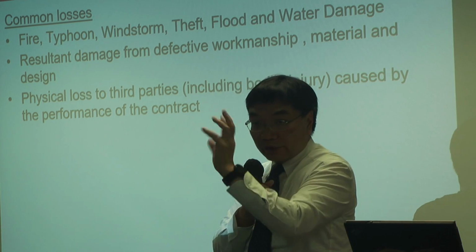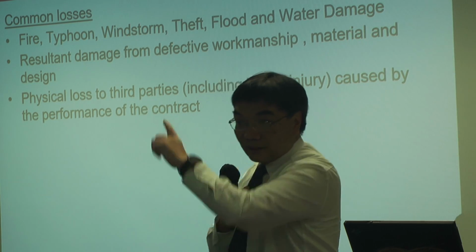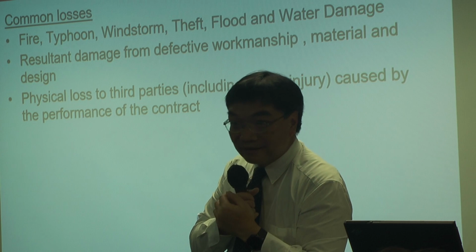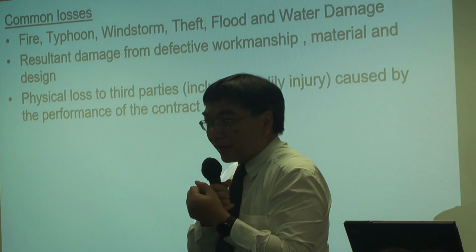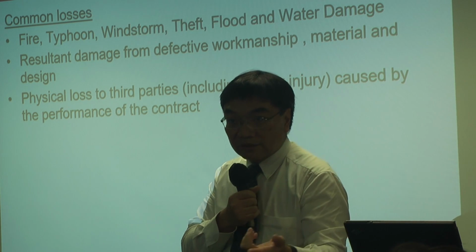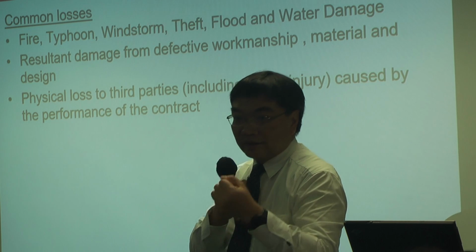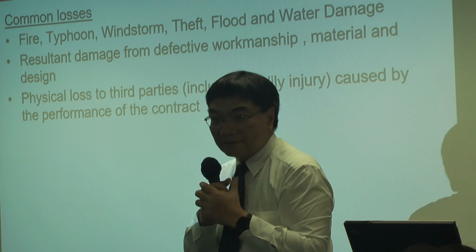Normally if a typhoon is approaching, you have to put it in neutral gear, let the tower crane swing freely, right? Yes, but sometimes when the typhoon came after the construction work hours, they just did not put it in neutral gear, then when the typhoon hits, it collapses.